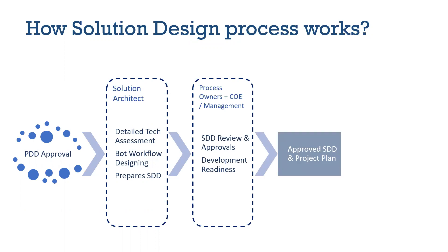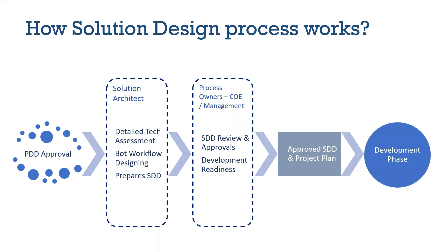Once we have an approved SDD, a project plan is prepared — or if already prepared, it gets revised as per the detailed assessment of the process. A revised project plan is prepared or updated, and then the initiation of the development phase gets started. So this is how the entire flow works in the solution design process.